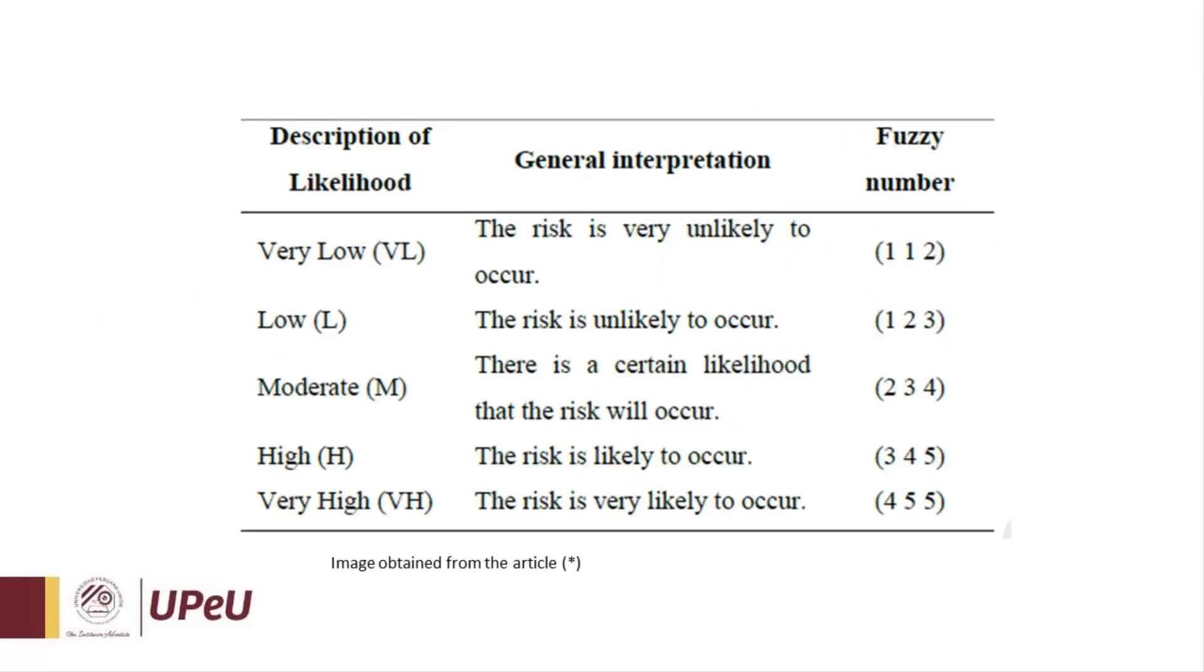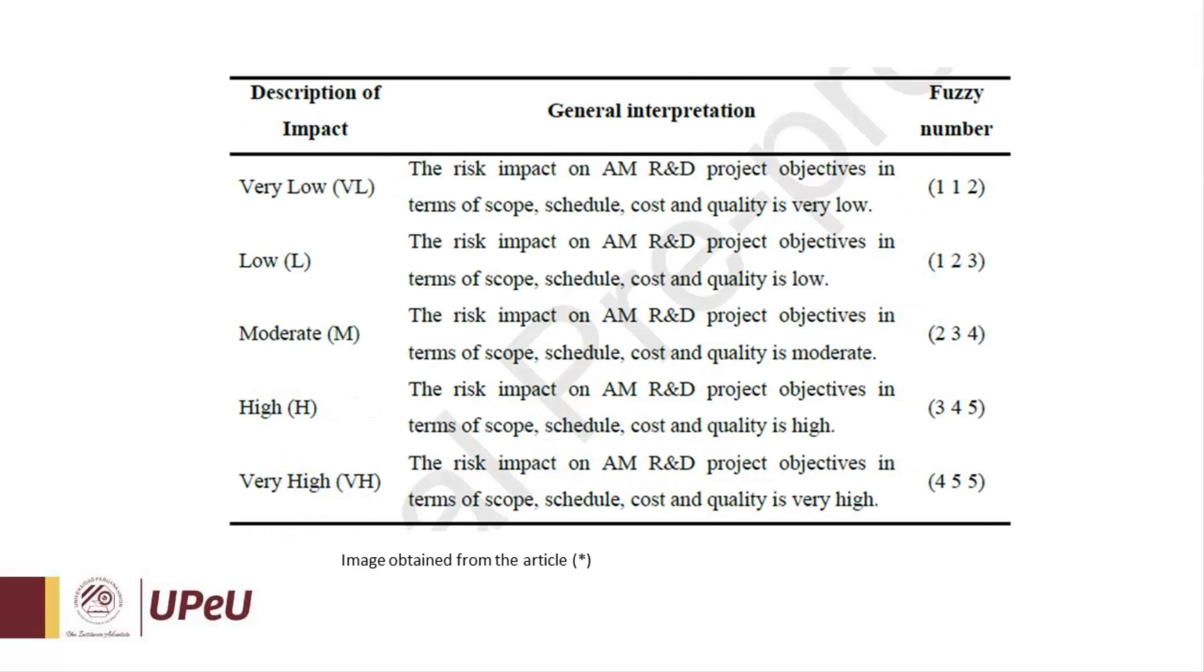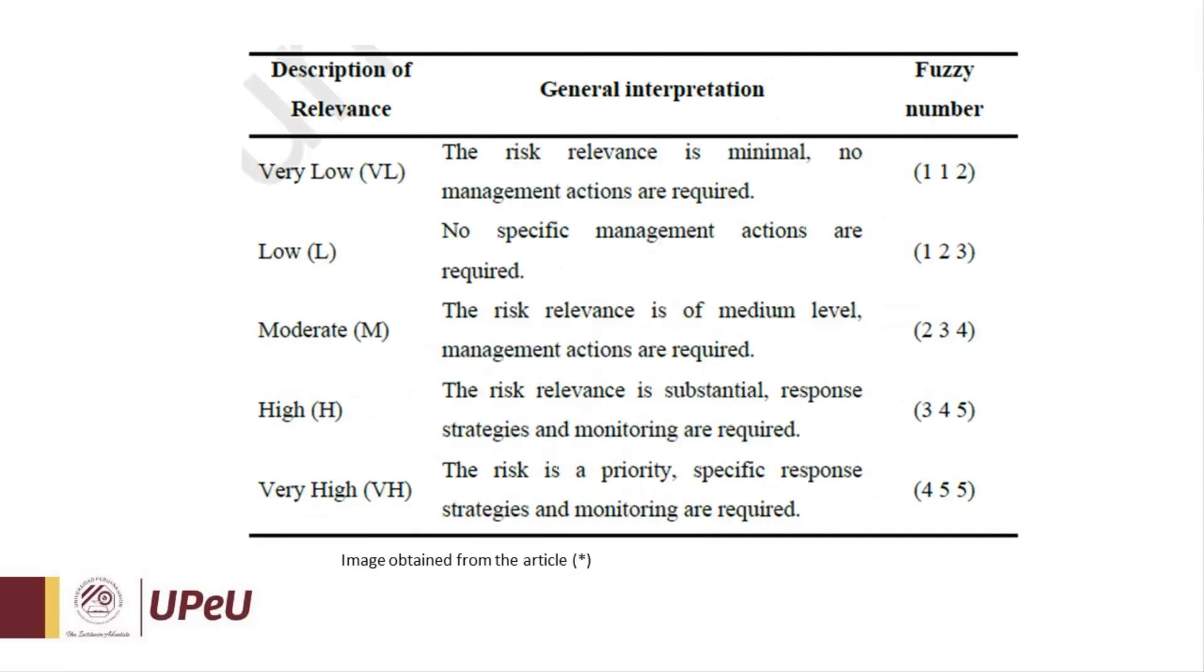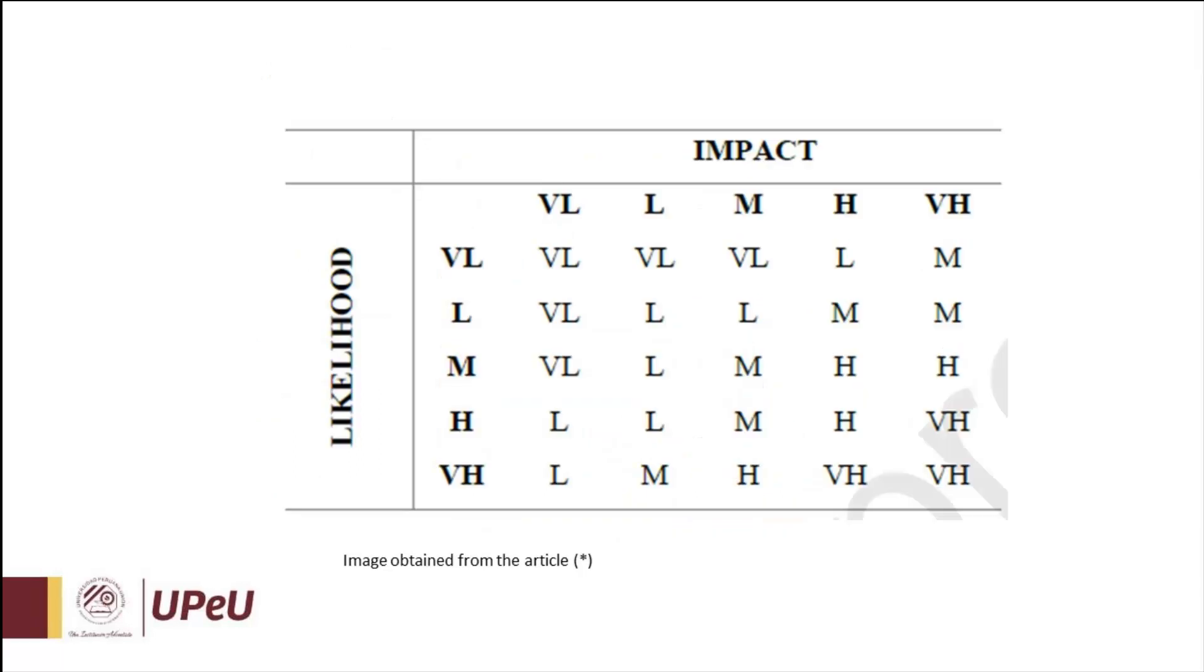On the other side, we can see the description of the linguistic variables for the input likelihood—the interpretation of how likely those risks are to occur and their respective fuzzy numbers. The same with impact and the output relevance. Here we've got a matrix of likelihood versus impact which will be useful to set up our fuzzy rules.